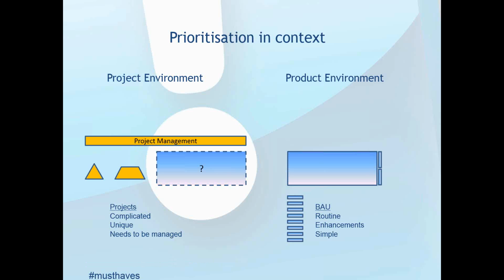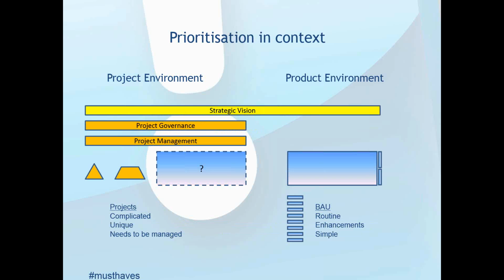So you need a project manager, and you need a project manager who understands MoSCoW, and you also need governance, for example a steering committee or a project board, and they need to know what MoSCoW is as well, because it's quite possible we might drop things out of the project, and we don't want someone on a steering committee saying, well, I'm missing something and I'm not very happy about it. They need to understand what Agile is and what DSDM is.